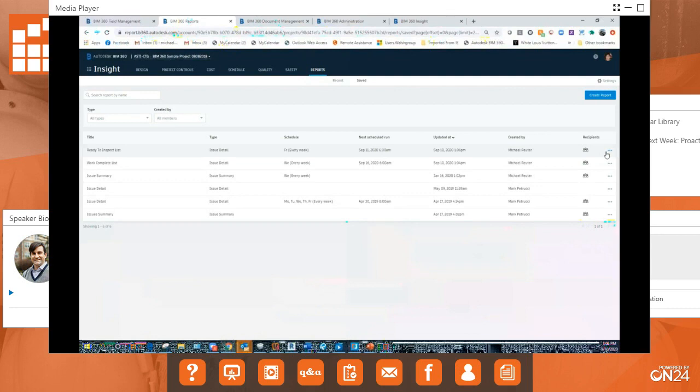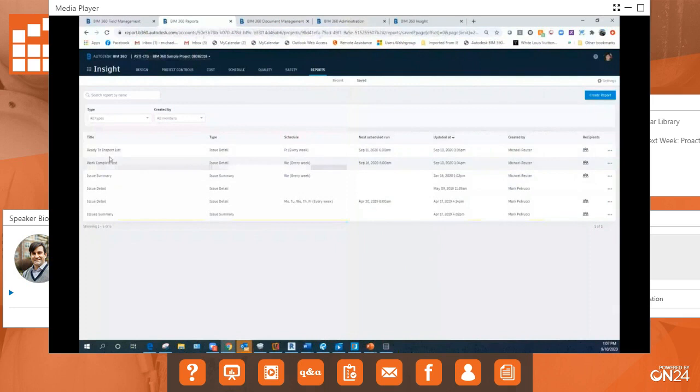What's beautiful about BIM 360 is that with the issues, there's a workflow there. The issues are assigned to someone, they fix them, they document that they fixed it by taking a picture or by saying, here's what I did, or changing the status. And then you've got a workflow to work off of. So the data is pretty much live, right? That's helpful because the data is all in one place.